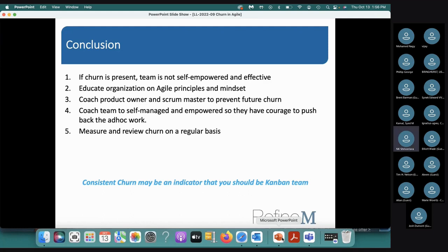So that's important to note. So if you have priorities changing so often that you cannot even sustain a one-week sprint, then probably Scrum is not a good model for you. You should think Kanban or Scrumban or something else, but not Scrum. Scrum will create churn and the planning is not meaningful at all. The time you're spending on planning is of no use. Somebody was asking about the startup and this issue. So think about that. Is Scrum the right model for you? Okay. I'm not saying change it, but think about it. Think about Kanban, think about Scrum, think about other ways of implementing Agile.